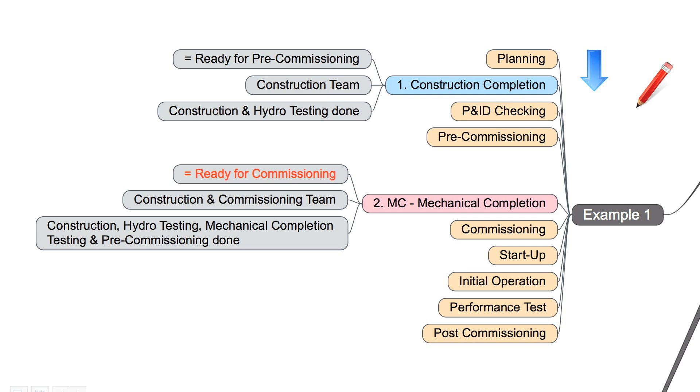So you can see in this example the pre-commissioning activities are included into the mechanical completion. Mechanical completion means I am ready with all my pre-commissioning activities like blowing, flushing, cleaning and all the things. So let's check example number two.